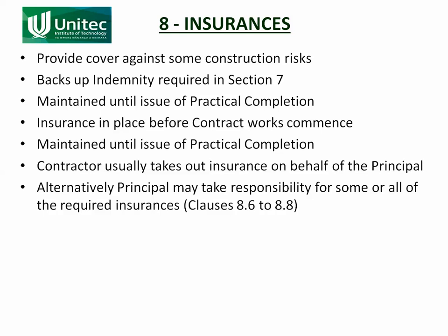The insurances are required to be in place before the contract works start, because things can start going wrong right from the start. If something goes wrong, you want the contractor to be insured against it. If not, then either the contractor will have to pay for it, and if the contractor can't pay for it, then the principal will. So it's there to protect the principal as well as the contractor.